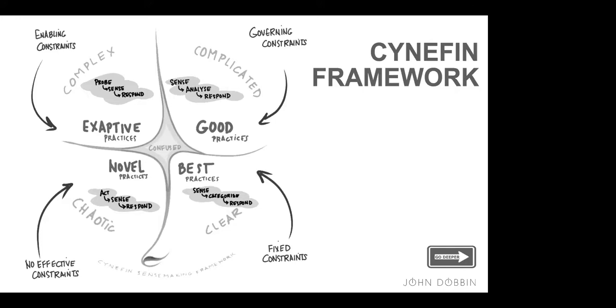And usually when we come across a new project, we start from the confused state and we ask ourselves questions. We say, is this a complex problem or a complicated problem or a clear problem? And we keep asking questions until we know what type of problem we have. And then depending upon what domain it falls in, the model tells us how to act. And so for that, it's called a sense-making model.